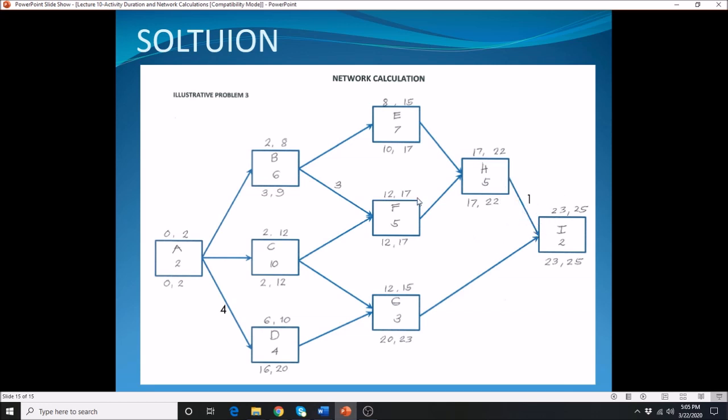Alright, so again, once you draw the network diagram, one thing that I want to point out here is that when you draw the network diagram, connect this finish to start, because in most cases, as you've learned in the fundamentals of network diagramming, there are several relationships in given activities, and in most cases we have the finish to start relationship.